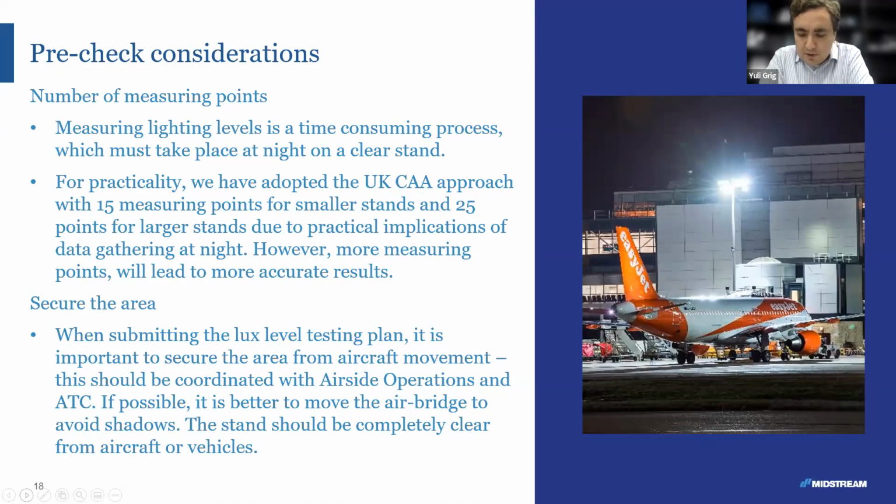Pre-check considerations. Okay, so these are some of the things that we need to think about before we start going out to the apron and measuring. Okay, and the main considerations are this: a number of measuring points. Measuring lighting levels is not a quick process. It is time consuming. It needs to happen at night time for obvious reasons. It needs to happen on the clear stand, so there should be no aircraft. Therefore, we can't spend hours and days on this. Okay, we have to be practical in how much time we spend.